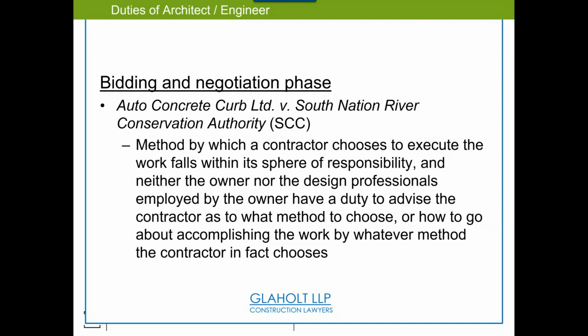And we've seen examples where I've been asked, we deliver an LOD 400 model. My immediate and instant answer is no. We could make 400 models, but as an architect, as engineers, we don't deliver, because now you're getting into means and methods of fabrication and production.